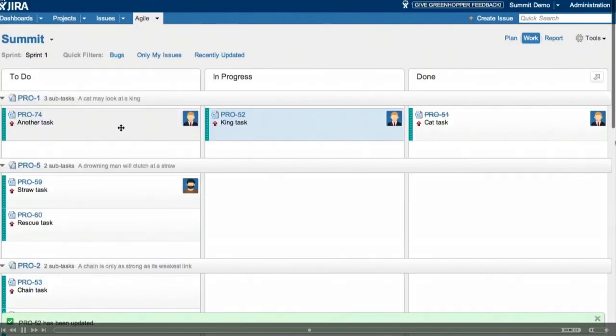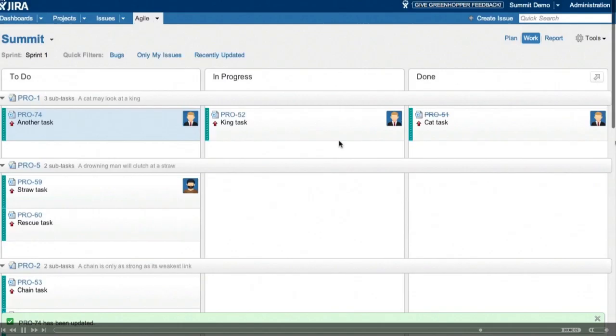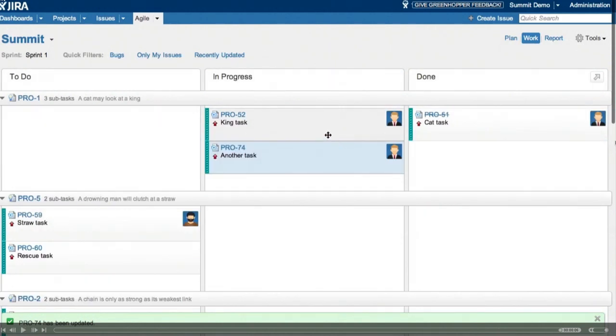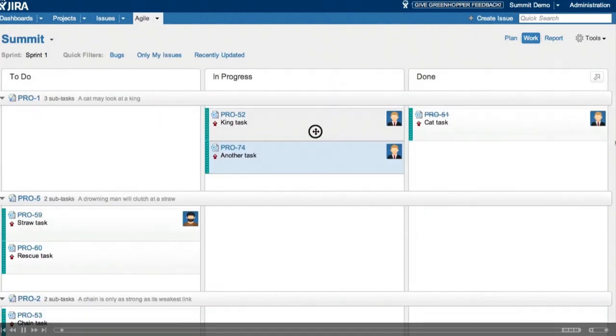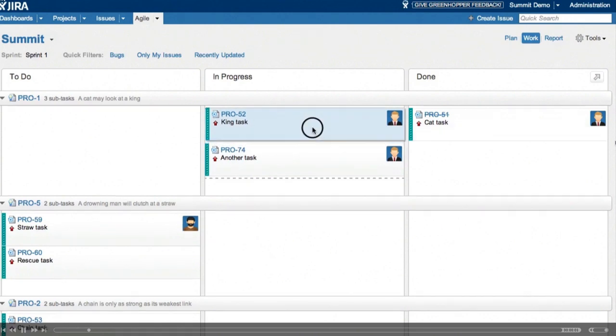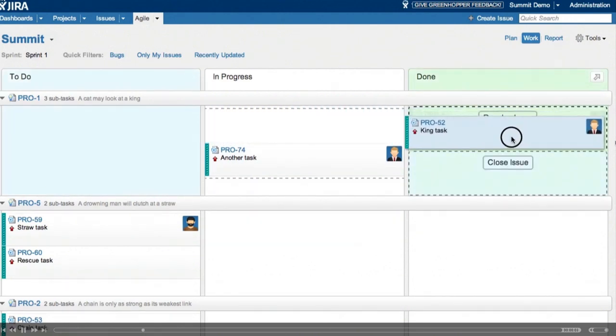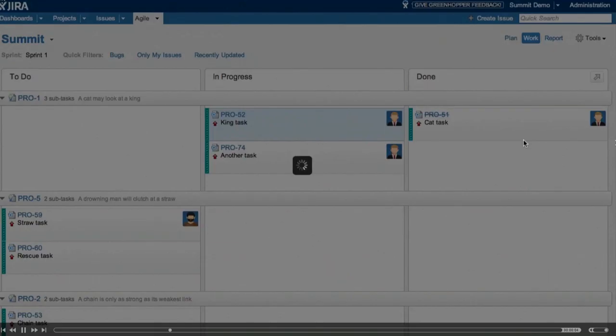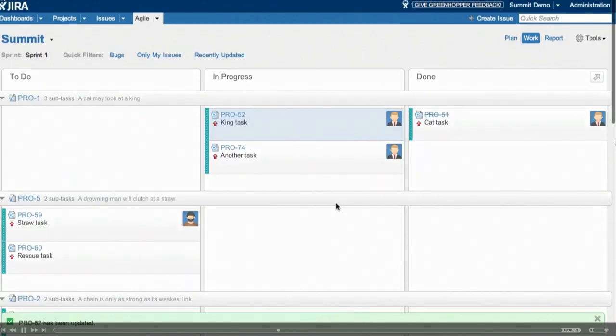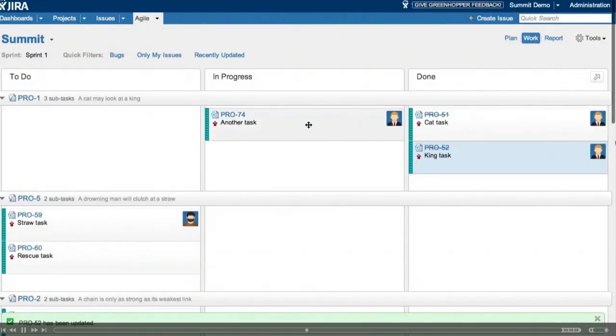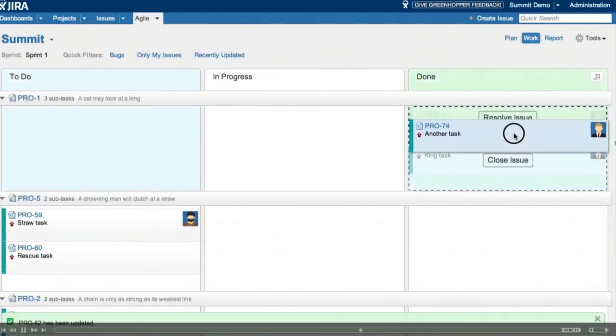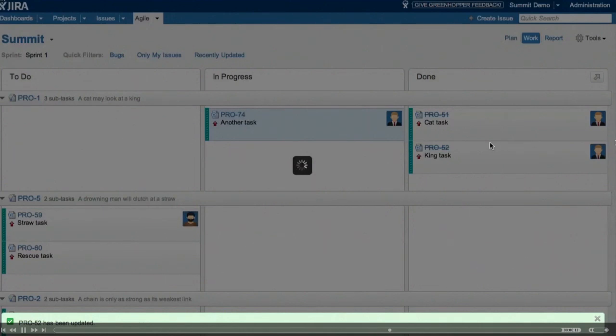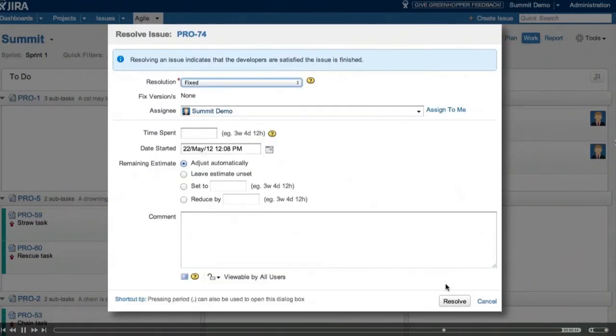So I want to show you what happens when you complete all of your subtasks for a story. So what we see is as we complete the last subtask, we're prompted to update the parent. And this is a great way to keep everything in sync.